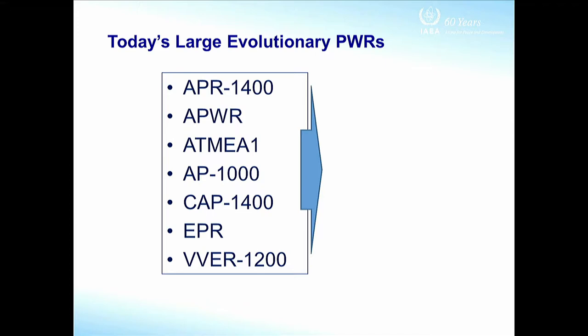Again, it depends where, because if I look at the same reactor being built in China or in the US, the overall time of construction is very different. Or even a Gen 3 plus reactor like the VVR 1200 in Russia. It's not mission impossible to respect those, though of course they were demanding. And please also consider that we are talking about the first of a kind, while that number was considered for the nth of a kind. The first of a kind historically has posed a problem, in particular during the construction, and also the need to modify the design during the feedback on the design. This is why we build the first of a kind, to have this return of experience.